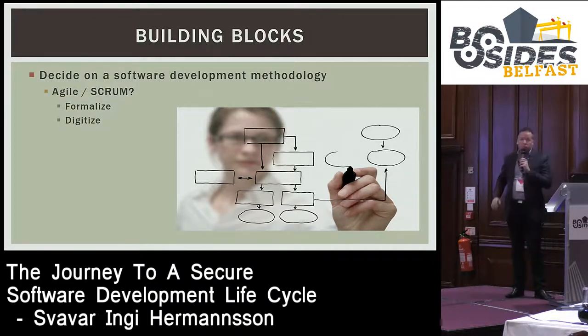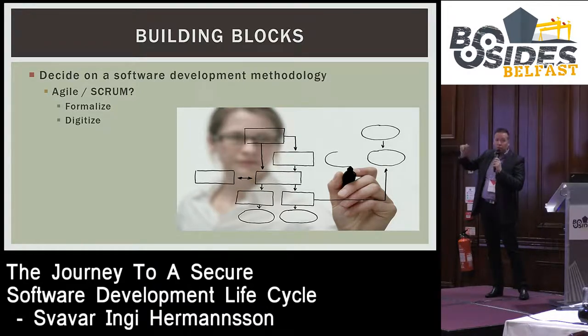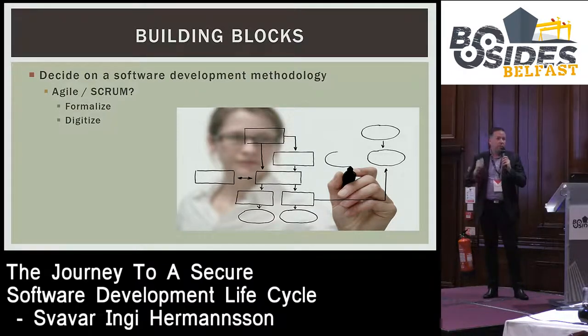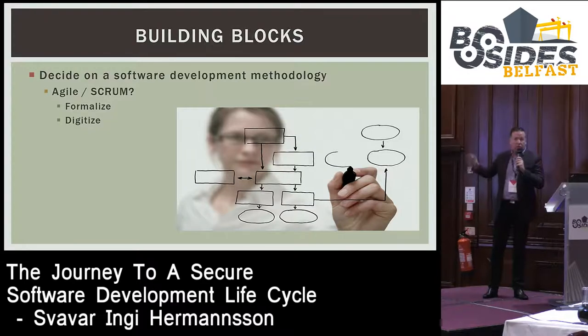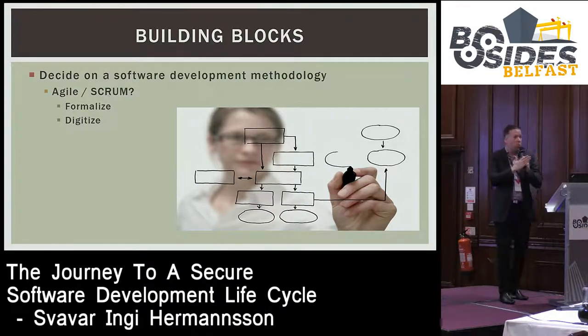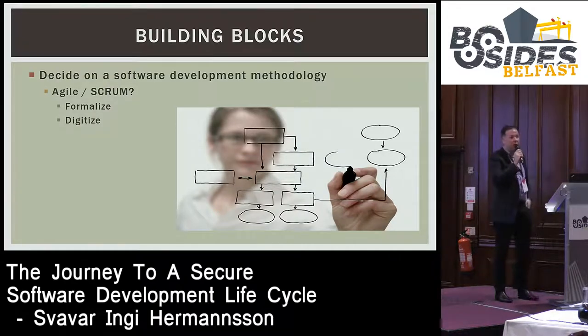and he shows us the whiteboard. And he goes like, yes, so here you can see we have these post-its, and on the far left, we have tasks that are in the sprint that have not yet started. In the next column, we have tasks that have been started. The column after that, we have a list of tasks that have been started but have hit a roadblock and are now stalled. The next one, we have a list of tasks that are being tested. And then the final column, we have a list of all the tasks that have been closed, that have been tested, passed testing, and have been finalized.